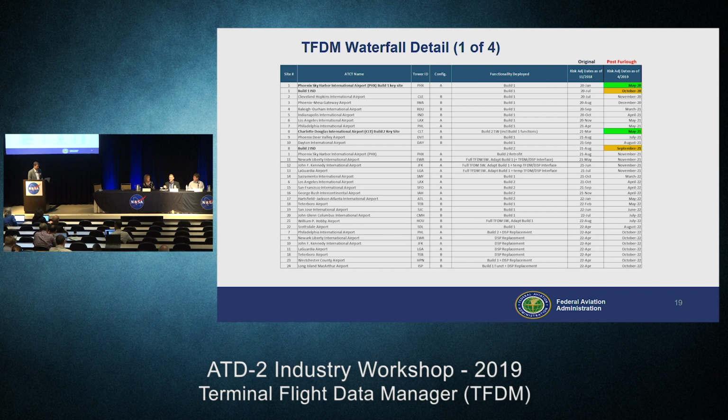But the amount of activity required to get an in-service decision, because it's basically a blessing for us to deploy to the NAS and never have to go back for tasks except for Build 2 capabilities, is a lot. If there's open issues on the in-service decision checklist that are not critical to the operation in the NAS, we have to develop POA&Ms, plans of action and milestones, to get those corrected. Those all have to be worked out and approved by the different parts of the agency that have those items on the checklist, so that they agree with our plan to fix any issues that are open. There's a lot of coordination that has to go on just to get through this process. It's almost as difficult as trying to get a final investment decision, and that is extremely difficult in the agency. So I don't know if that...